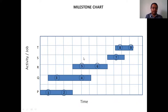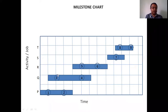It doesn't mean that to complete the fourth task, the third milestone has to be completed first — just because four and five are starting simultaneously. Within Q activity, to go to the fourth milestone, you have to complete the third milestone. So within the activity you can show dependency.